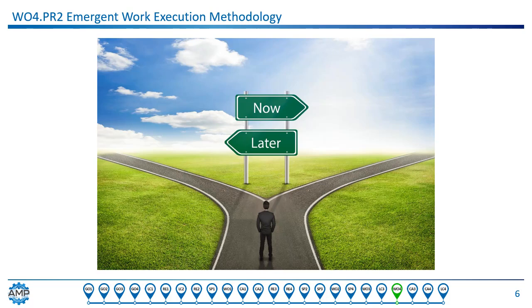Previously, we've talked about emergent work as in the case of an emergency where there's imminent danger to equipment or personnel or the environment. There's another type of emergent work as well. When doing an inspection, what happens if failure indications are discovered? In theory, the inspection is performed close enough to the P point on the P to F curve to allow time to perform a separate corrective work order to address the found issue. In practice, we always say, well, we're already here, the equipment's already locked out, and we have qualified people at the job, why not just go ahead and make the repair?